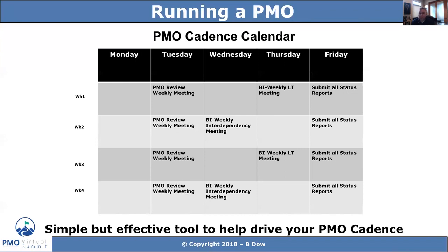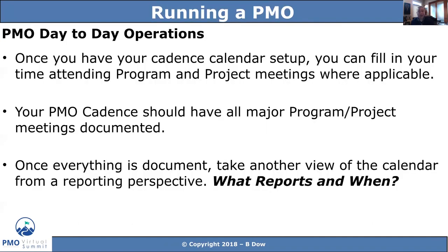Now, for a directive PMO, for example, this is a must-have, right? And so you're saying, hey, you guys got to attend these, you got to submit the status reports, and so the cadence calendar works very, very well in a directive PMO. So once you get that set up, you have a calendar set up, then what I do is I start getting the major programs and projects. So what are the key components that you're going to want to track, and get those documented on that cadence calendar as well. Once everything's on there, you can start looking at reporting and when that happens.